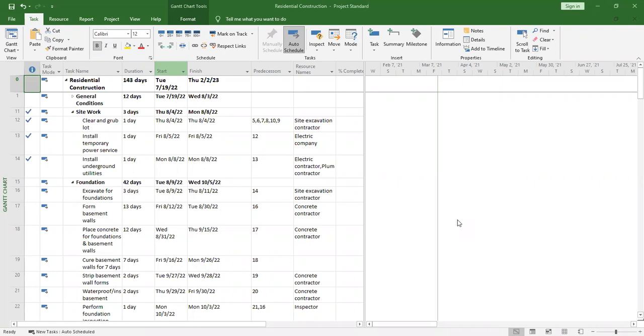So I was still talking about value analysis, that you want to evaluate which kind of value you are getting from doing that project. Like the task has taken 5 days, fine, but have you used the same amount, like what you've planned? Isn't there any cost variance? Isn't there any schedule variance? If you planned the task to take 10 days and now it is taking 15 days. So how much has it costed you?